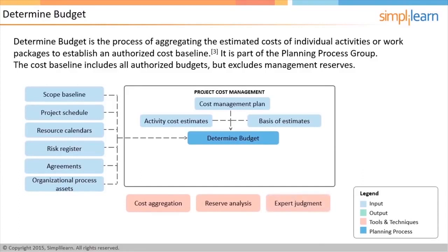Expert judgment is a technique in which an expert's help is sought to estimate the activity cost. An expert is someone who might have worked on a similar project in the past and has a good idea to estimate the activity cost involved. Historical relationships are used to predict the total project cost using a mathematical model. This is similar to analogous estimate or parametric estimate method.